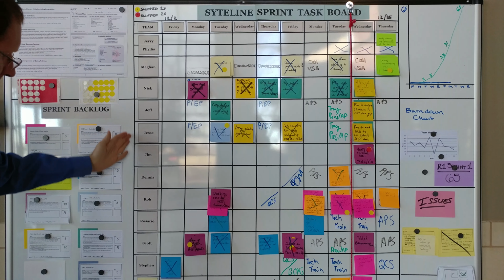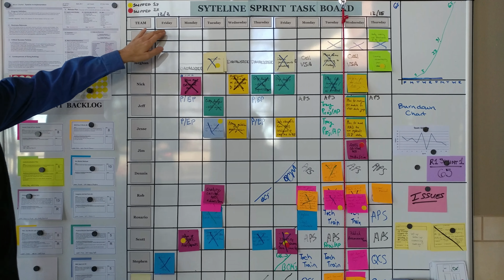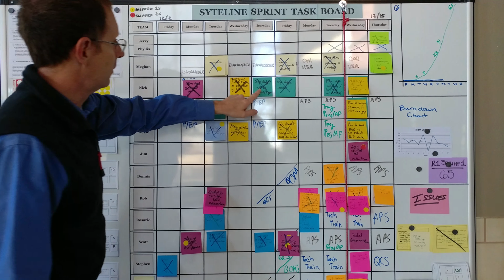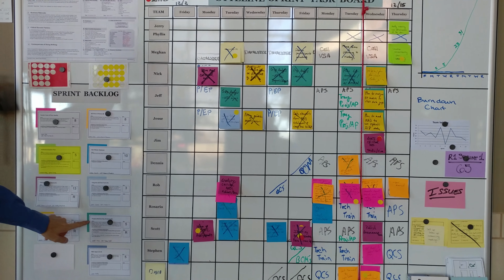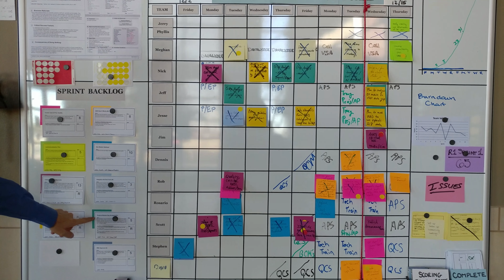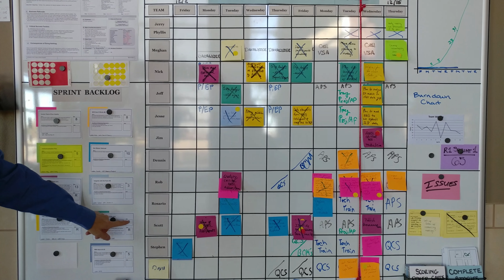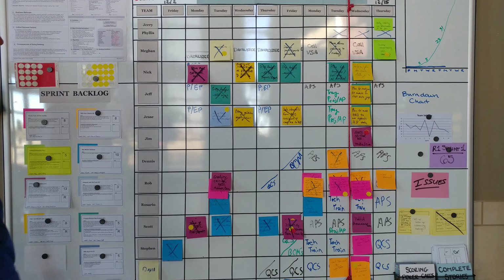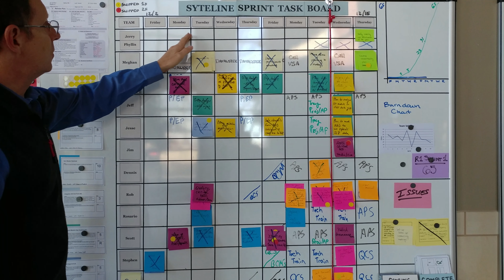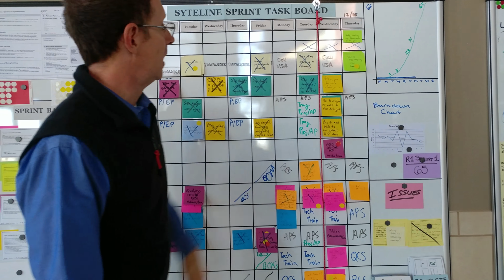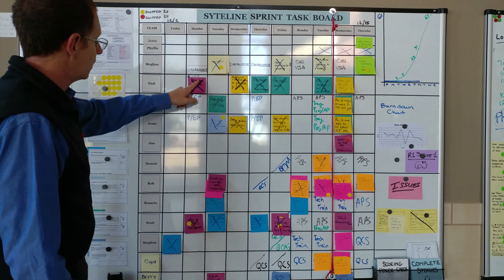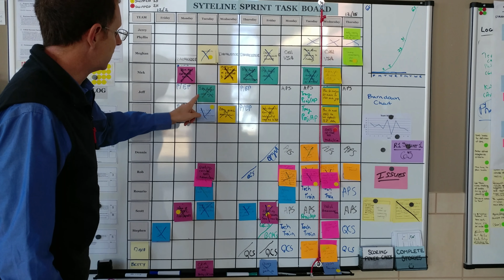So here are all my team members. Here are the days of the week. And here are the tasks, for example, that correspond to the projects module gap analysis user story, which is a research spike worth 5 story points. As the team progresses through their 2-week cycle, Friday to Thursday, 10 working days, they start to mark off tasks as complete.